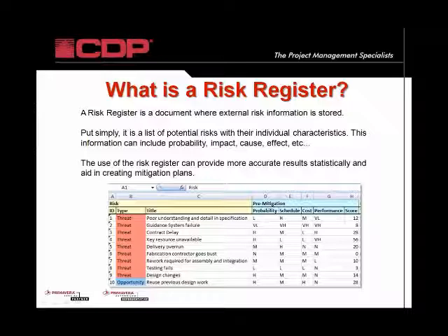The key, relative to doing a schedule risk analysis, is that when we bring something into a schedule, cost, probability, and duration can all hit the schedule. If you think about these risk events, items in a risk register really are activities in a schedule. They're just probabilistic, so they may happen or they may not.